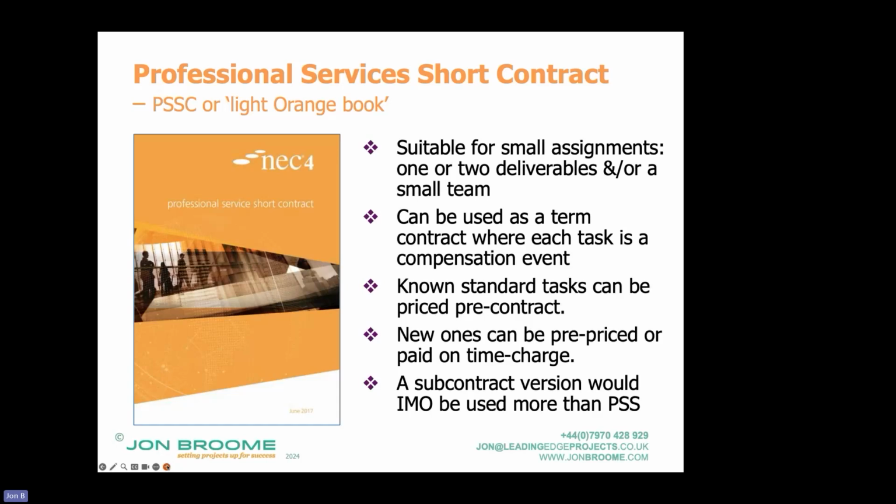So if we take my work, can you have a look at this contractual problem? Well, the first time I'm looking at it, I don't know what I'm looking at. I don't know whether it's going to be a long job, a short job. I might just look at it and then ring you back and say, you haven't got a chance. So that sort of thing, we'd use my rate, but it'd be times the amount of time I actually do.